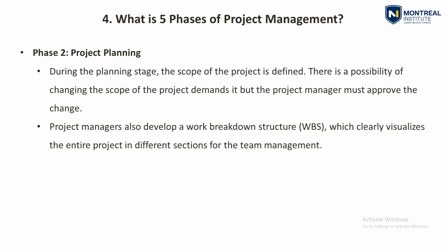For the sixth one, you can go for authority approval and handing over. So these are the default WBS that is used in Primavera P6. This WBS can change for very unique projects, but commonly these six WBS are used in project planning in Primavera P6, and you can use those in the next lectures when we go to that section.